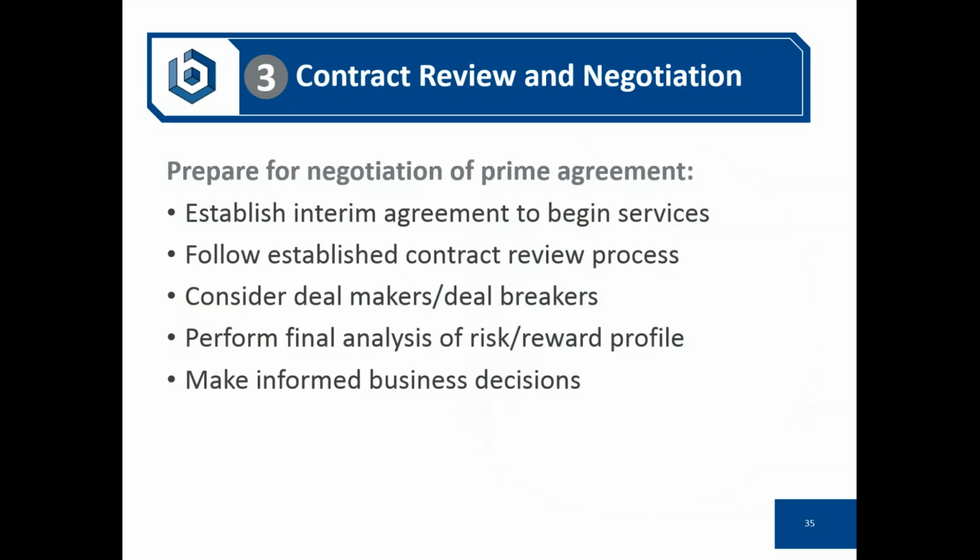You may want to establish an interim agreement to begin services if you're under time pressure to start those services and the bigger owner-architect agreement is not yet negotiated. You want to establish contract review processes that may, for yourself, establish a list of deal makers and deal breakers. An example of a deal breaker would be, for an architect, the responsibility for liquidated damages. This is a penalty that a contractor can bear if they're late in delivering a project, but is not insurable and is not fair to an architect.